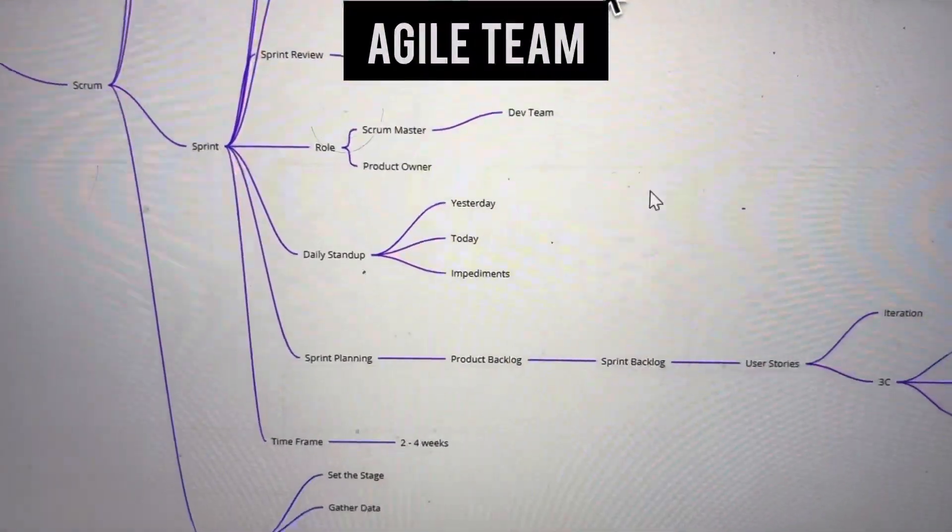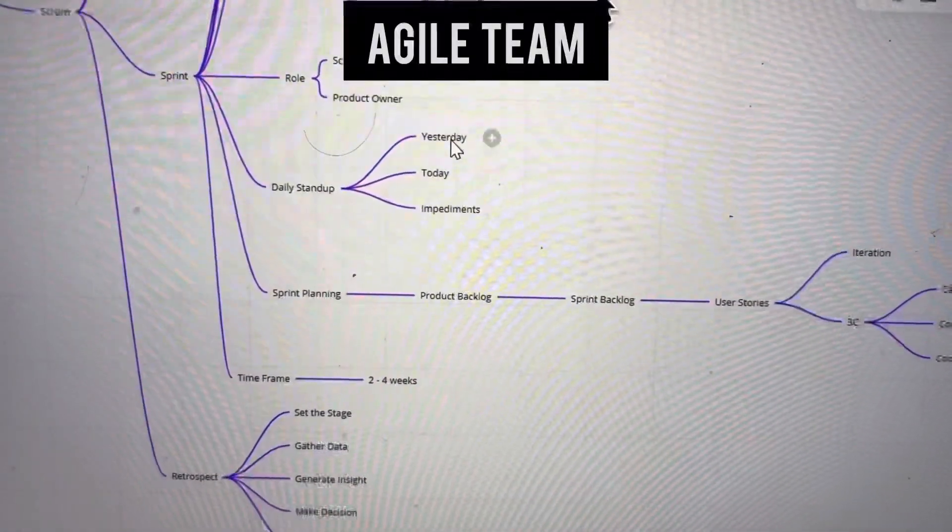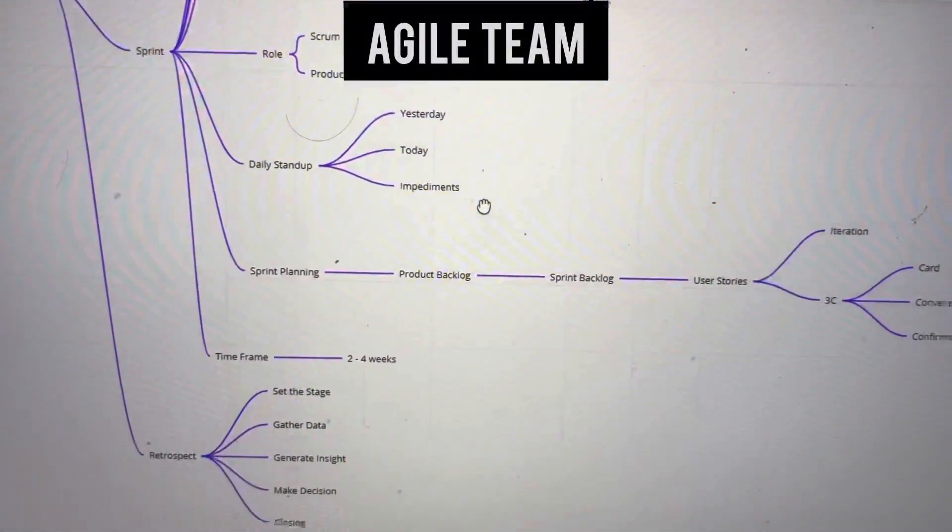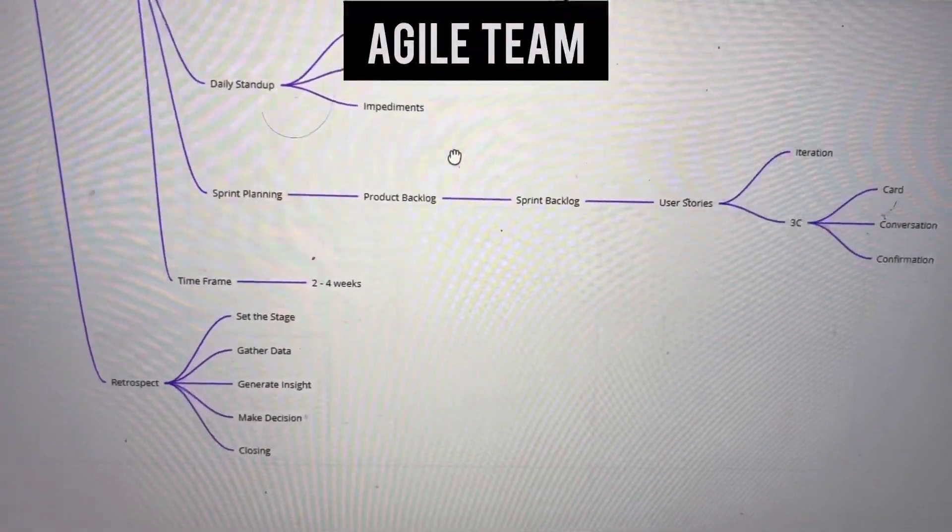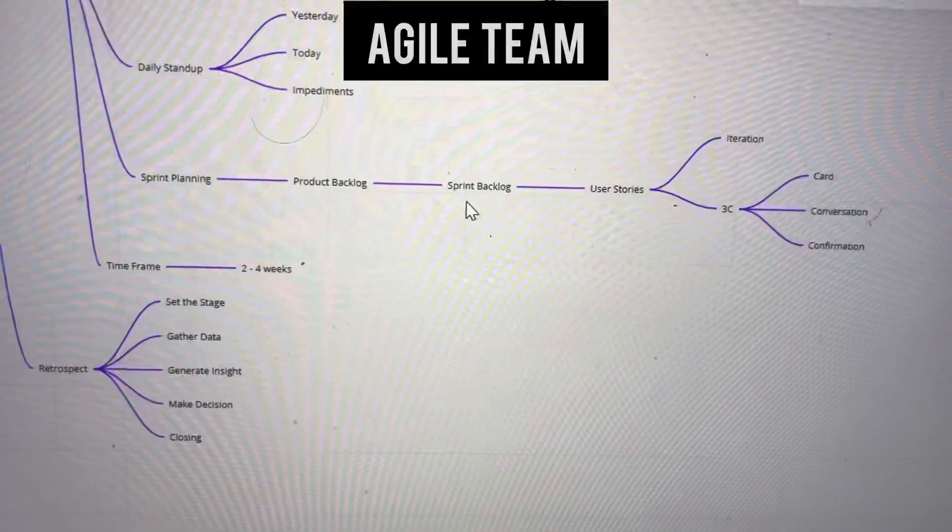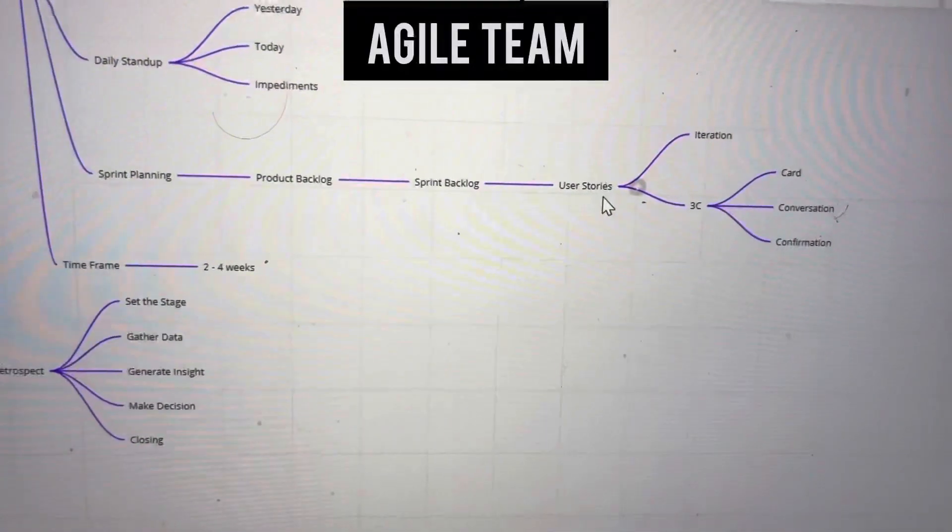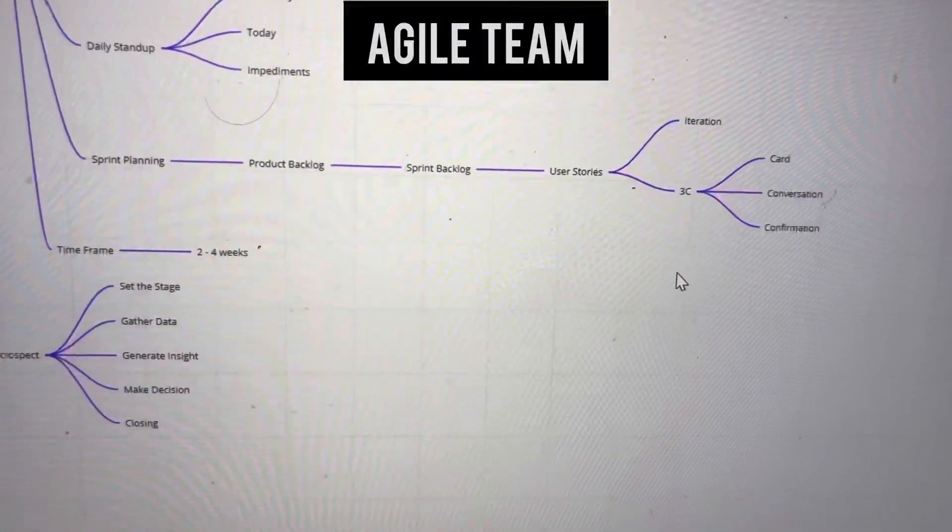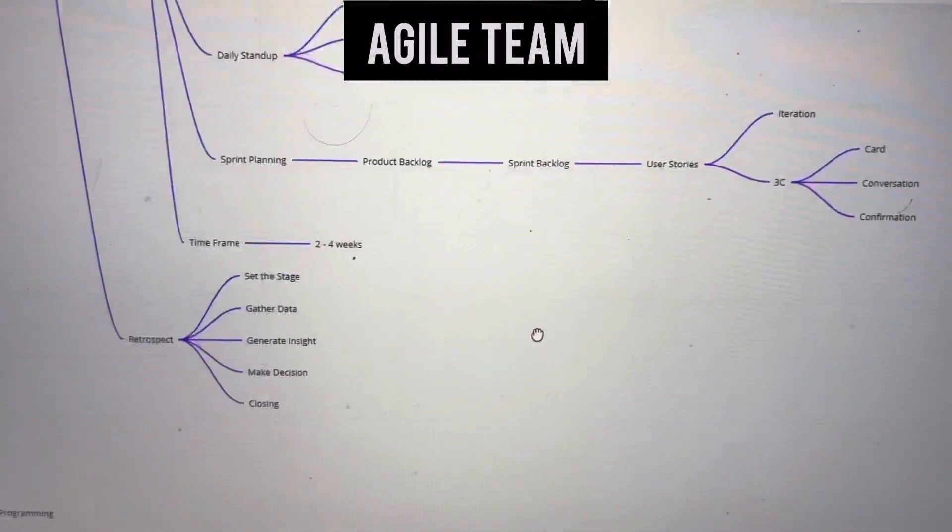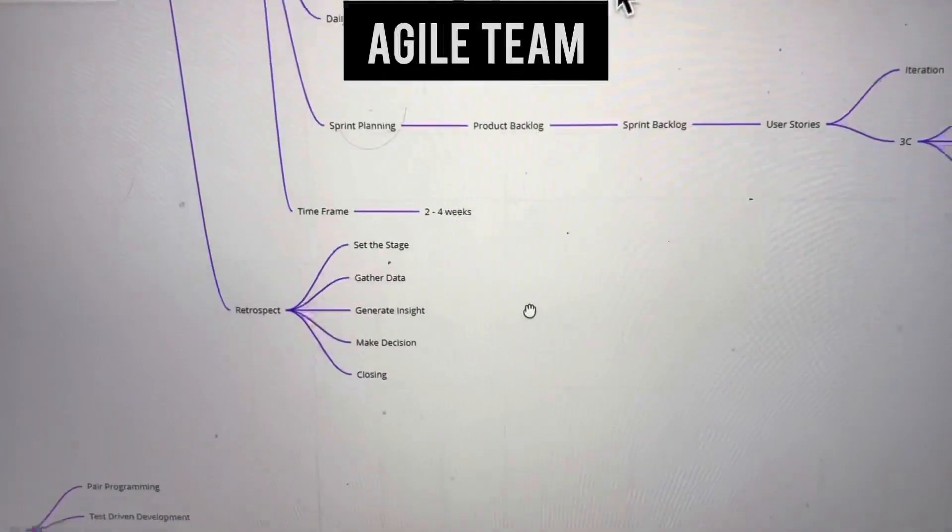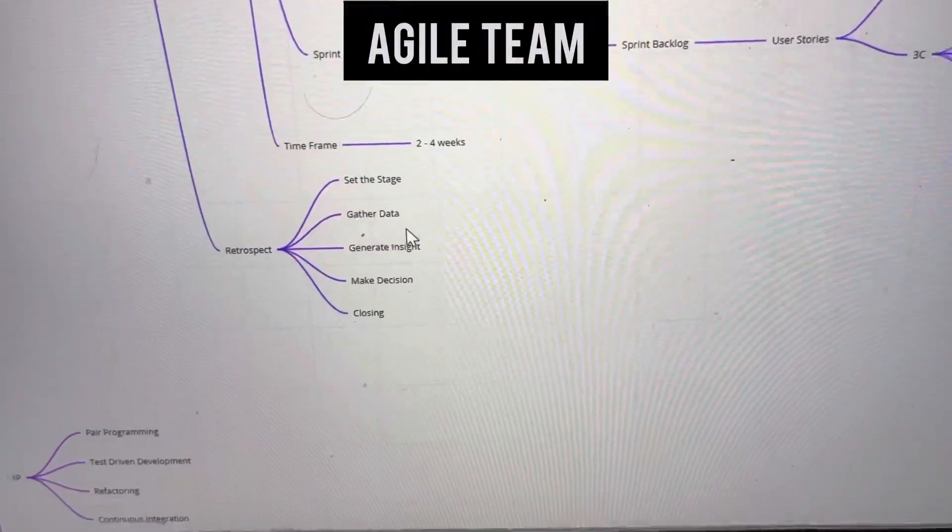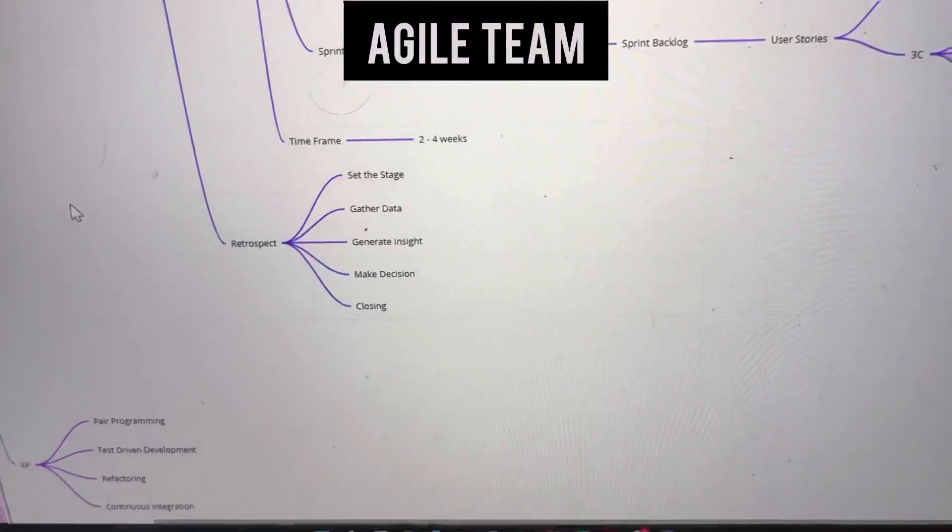Daily stand-up covers what we did yesterday, what we'll do today, and any impediments. Sprint planning involves product backlog, sprint backlog, and user stories. Iterations follow the three C's: card, conversations, and confirmations. The time frame is two to four weeks. Retrospective stages are set the stage, gather data, generate insight, make decisions, and closing.